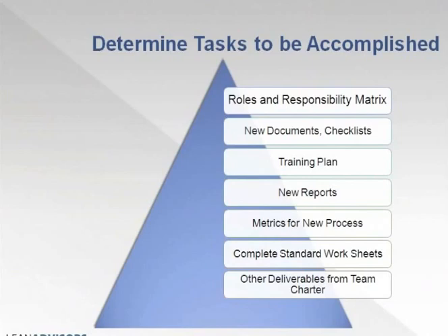Okay. All right. Other tasks to be delivered from the team. As you go through and do root cause analysis, you're going to come up with some things, and they're going to be things that go in parking lots. These are things that, yes, are there, but are a little out of the scope of what we're talking about. Let's put it over here so that as a team we move it forward to the next level and get it addressed by maybe another team or another group. Those are the things that we need to make sure are on our task list to complete.